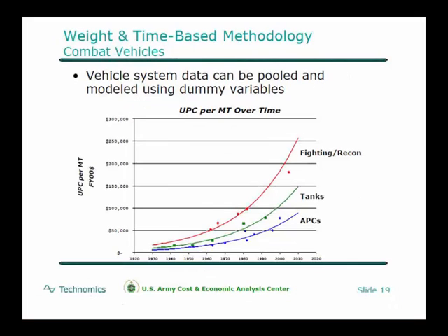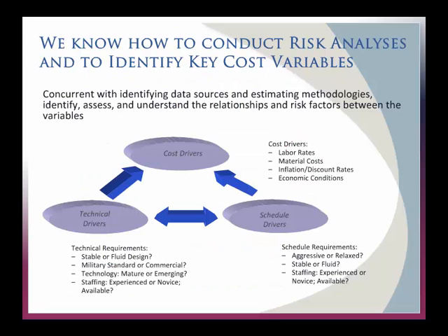And here what I do is once I've created my model that's creating a relationship between multiple variables with the existing data, now I can start to muse on new fictitious vehicles or potential vehicles using these dummy variables and look at what might a vehicle like this look like, what might a vehicle like that look like, and what might the associated cost of those things be. Once you've created a model, you can use it lots of times, not just once.